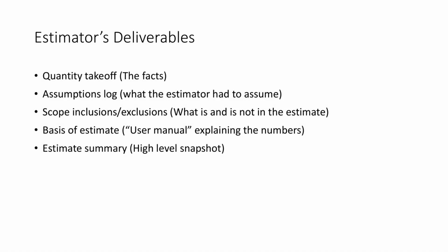And in terms of your deliverables as an estimator, you produce that estimate, but along with that, you hand off the quantity document. So your markups on the quantity takeoff document come with the estimate. Your assumptions that you had. So we talked about the fact that the drawings may not show everything. Your drawings are like a description of how the project looks, but they don't tell you how it's going to be built, or what other factors might impact your project, like weather characteristics or access to the site or site conditions. Those are not in the drawing.